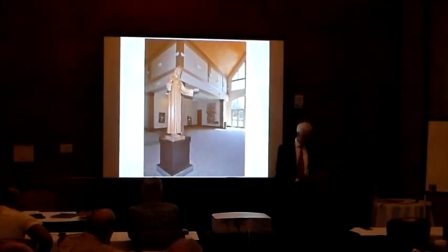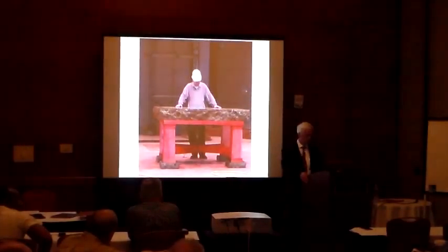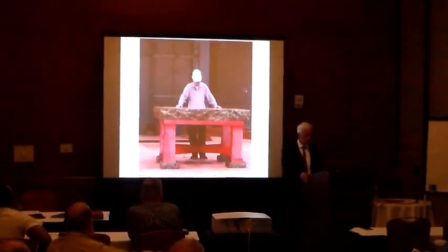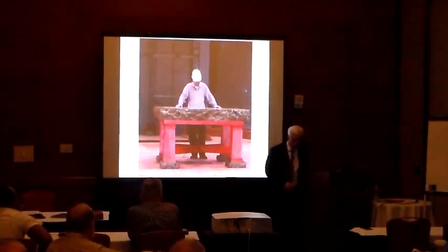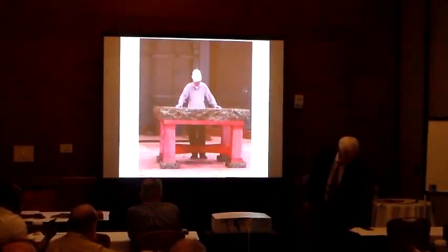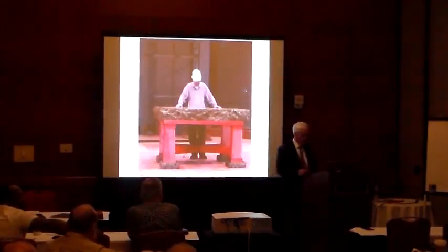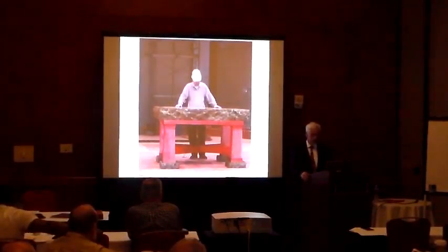That's correct. And so I've had one stop at schematic design because the parish didn't like the architect, and they ended up hiring a different architect. Same thing with CMGC. We guarantee the contractor pre-construction, and that gives the parish time to gel with the contractor, and then if they gel, we'll write the construction contract. Just so you have really, really clean breaks.